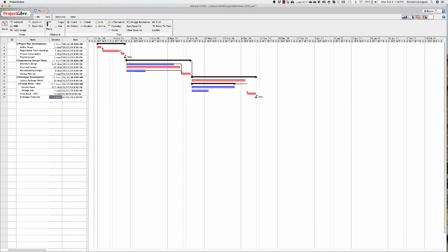Let's just say, and we'll just do it here, we're going to give the project completion a 3-day duration, and let's see what happens to it. You can see that it completed, but because we gave it 3 days, it pushed itself out 3 days. Now, why would you do that? I'm going to set this back to 0 again.